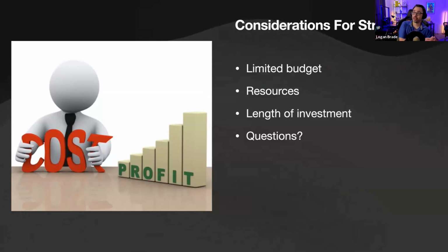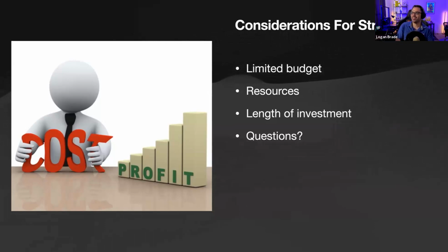Does your company have wiggle room to allow potentially a $100,000 difference in the budget? If you're limited and don't have a ton of wiggle room, it doesn't make sense to go with the native strategy if you have to learn the technology. If you already have developers who are competent and want to work in iOS and Android, then you might not have to worry as much about a limited budget. But generally speaking, if you've got a limited budget, hybrid can help you get to market a lot faster and a lot cheaper.